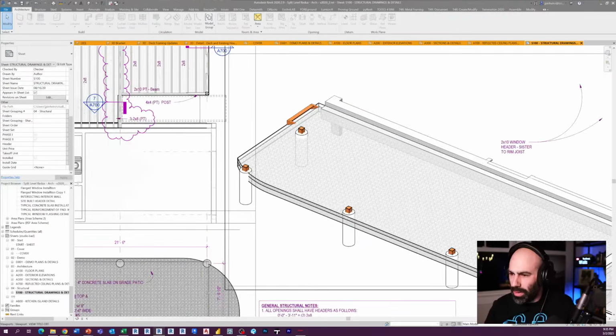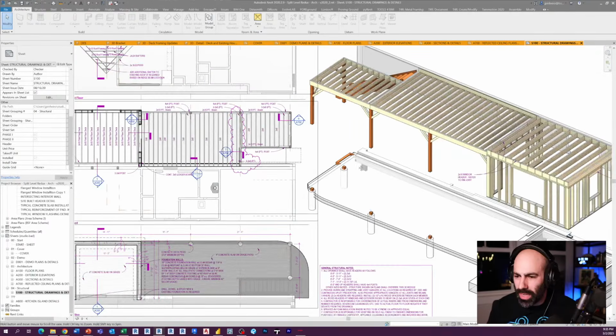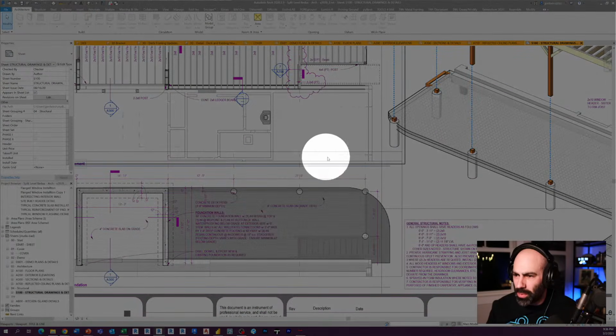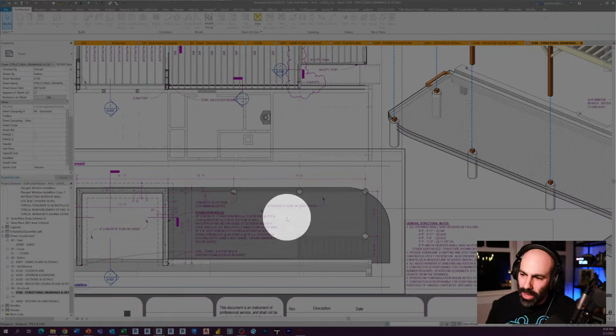The only thing that we kind of ran into during the concrete process, which was a pretty easy fix at the end of the day, but it did modify a few things for me, was this footing right here. We knew where the septic tank was, but I wasn't really sure exactly where the run for the lines were to it. The septic tank is basically over here if you're looking at this floor plan. You could see the pipe came out of the house somewhere in this general area, but we didn't know whether it turned, whether it went straight, and so on and so forth. And as luck would have it, it ran exactly where this column was located on my plans.